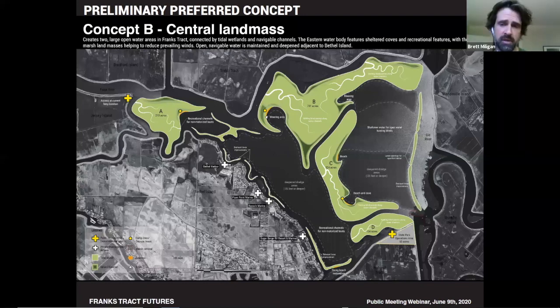That's something for more thought, but I think we would try to minimize the amount of space that would be impacted during that time. But like you said, while they're building that, I think that's an accurate assessment that those blinds would not be available, and how exactly we would do that during that time is something for further follow-up. Yeah, I agree. And maybe there's something you can do with seasonality of your construction too, so that you can avoid some of the higher quality hunting areas during the hunting season, and plan your construction phasing a bit around that.